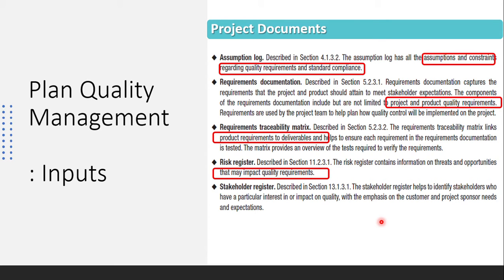Sometimes the risk register will also give you, as a project manager, some insights about the quality that is required. The risk register will highlight certain risks and threats, cybersecurity threats, or any other security threats they have encountered, and those things have to be tackled through certain quality requirements.